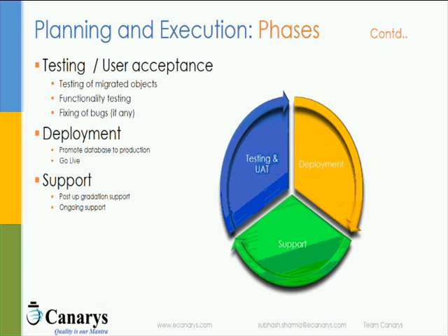After the test acceptance, the data is prepared for the upgrade on the live system. Deployment comes after UAT, and after UAT we go for the deployment with the live data. We deploy the new system to the production environment after we get the acknowledgement from the customer. And as I said earlier, the first deployment will be based on the test data, and if they are okay,